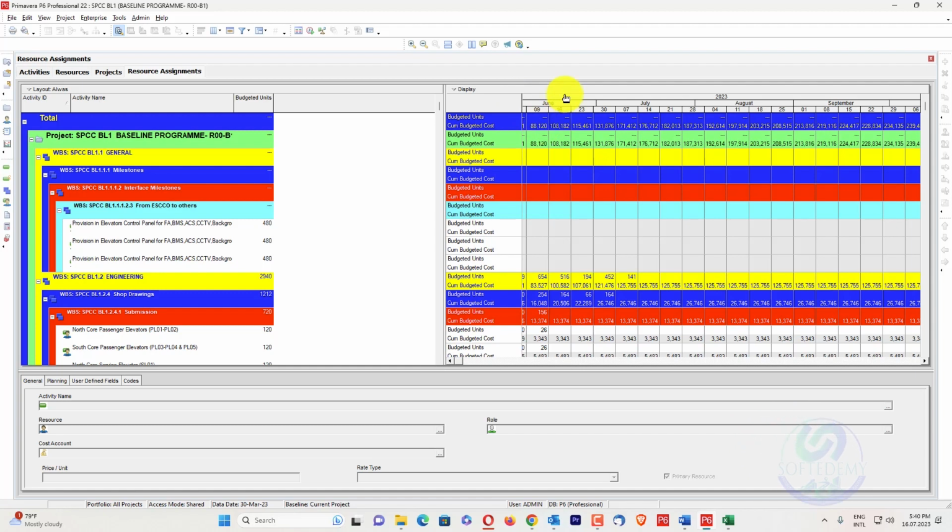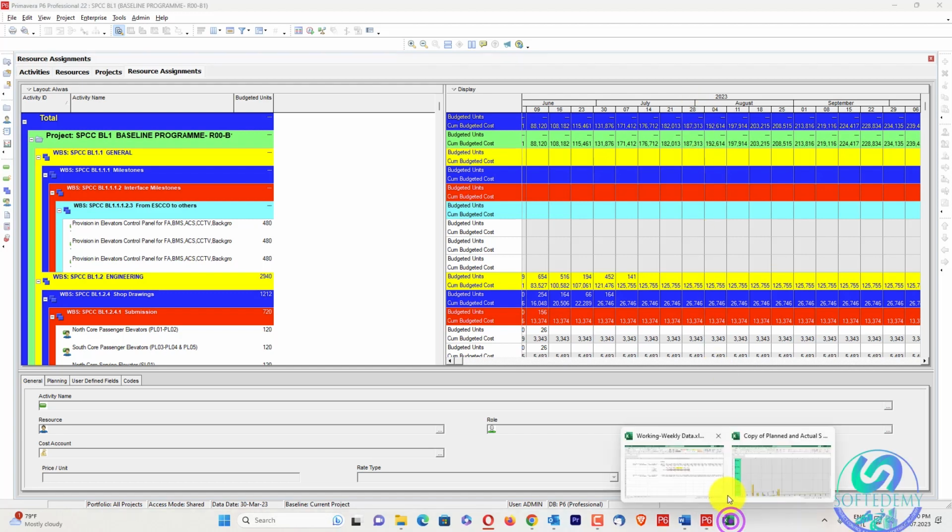Planned values, I consider as budgeted cost. So when budgeted cost is considered on a specific day, on that specific day it will be the accumulated planned value cost. For example, it's 28. So until 28, all the accumulative to date is your planned value cost. So that's a lump sum I consider. So I will go again to my data.